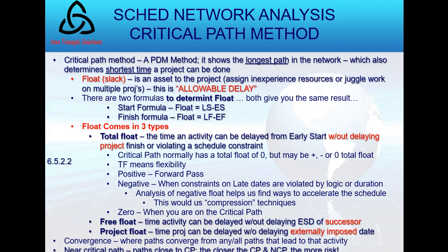Great. I just gave you a second to soak that in. The schedule will have float, or sometimes we call it slack. This is an allowable delay between some activities. And the way you determine that is a formula. I'll repeat it in a minute. But it's late start minus early start, or late finish minus early finish. I'll go over it again in a second.